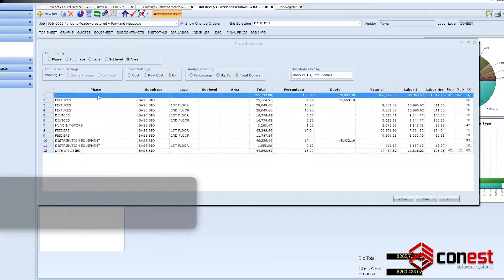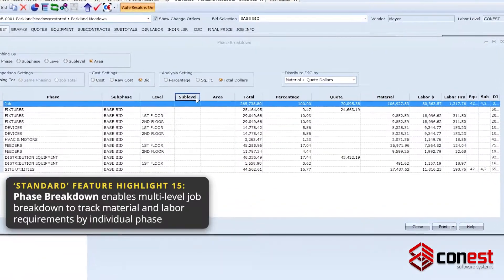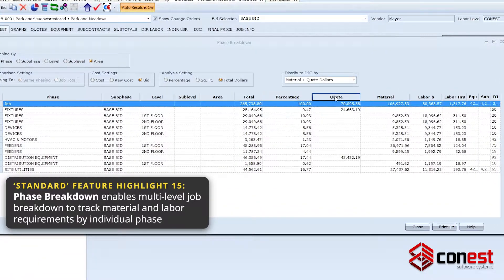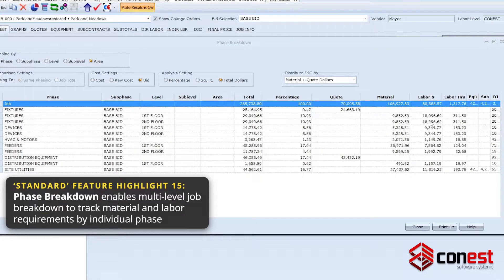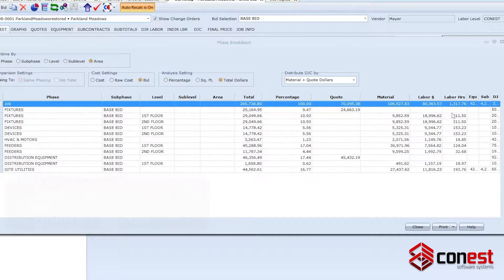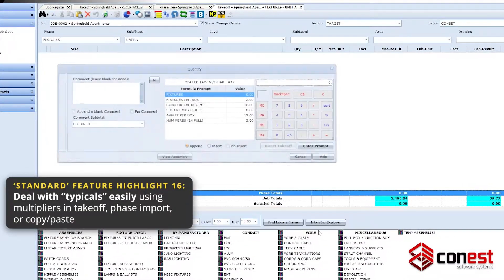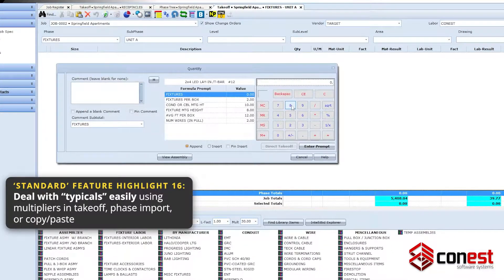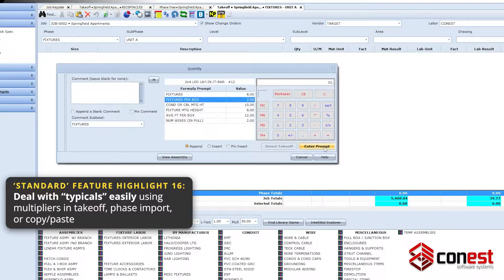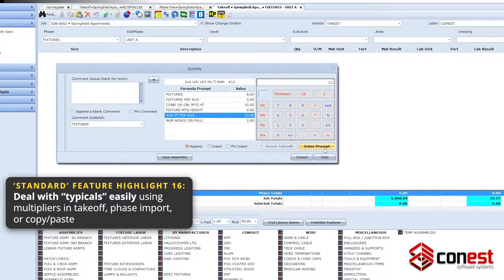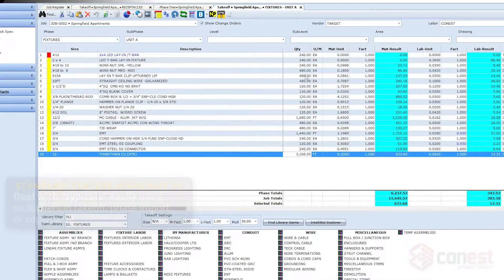Track material and labor requirements by specific individual phase with phase breakdown. Finally, deal with typicals easily using multipliers in takeoff, phase import, or copy-paste.